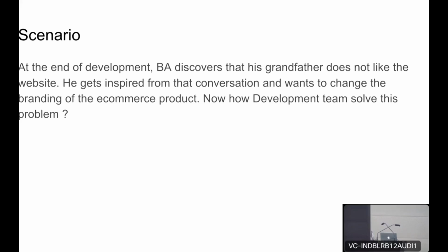So experience doesn't work for technology, but it works for these kinds of situations. What we did is, say for example, his name is Krishnan. We'll change the name. We called Krishnan and said, Krishnan, this is a very valid requirement. I know that you are sincerely working on the product. Now, if you want to do it, there are these tasks that we have done in Jira, which have taken this amount of time, which will go invalid. There are these costs that we have spent, which we need to rework, which will add another cost.